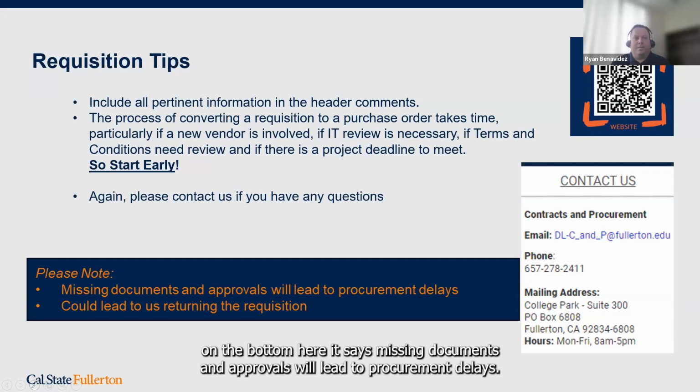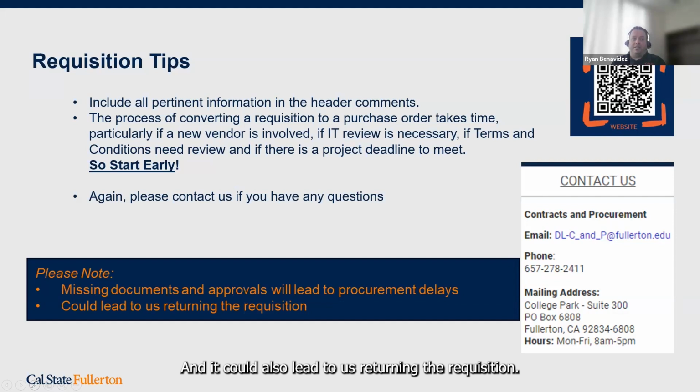Please note on the bottom here, it says missing documents and approvals will lead to procurement delays, and it could also lead to us returning the requisition. So please include everything that is important to the requisition.